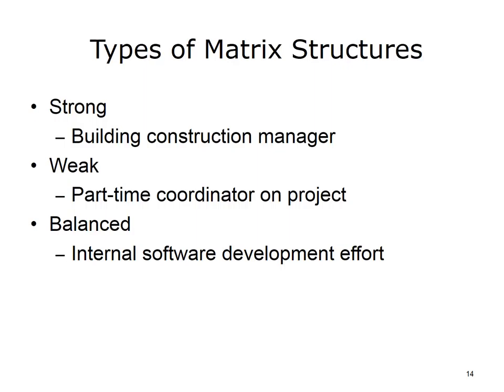In a strong matrix, the project manager has all the power. This may be illustrated through a construction site manager who manages all the subcontractors, all the inventory, and is ultimately responsible for the end result—that is, the building being built to specifications. In a weak matrix structure, someone may be called a project manager, but he or she has little or no authority or power. In reality, this type of manager is more of a part-time coordinator on a project. A weak matrix often indicates that an organization is not far down the path on managing projects, according to the Project Management Institute's model.